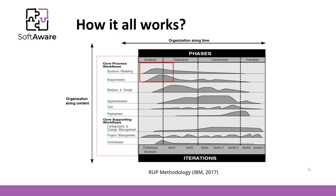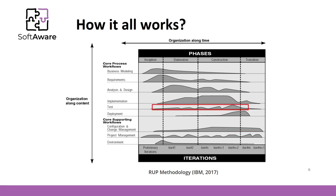During the inception phase, business modeling and requirement-related activities are the most intense. During the elaboration phase, analysis and design — basically software modeling activities — are the most important. Implementation is tightly related to the construction phase. Deployment and configuration management activities take place mostly during the transition phase. Some activities, like testing, are performed at a similar intensity level throughout the project, with testing intensity slightly increasing towards the finish.